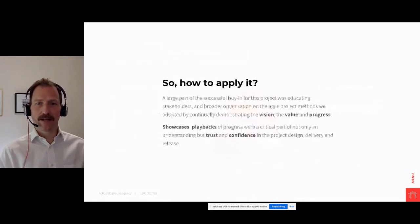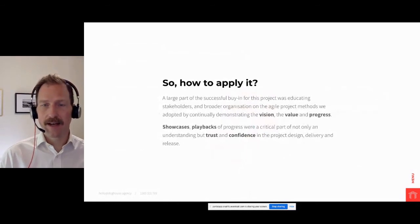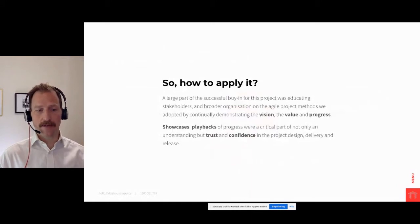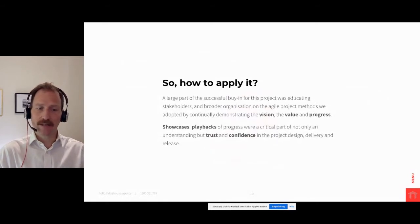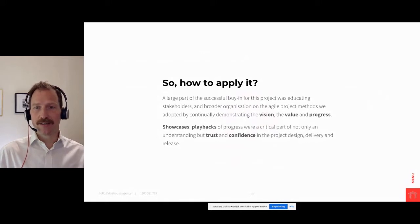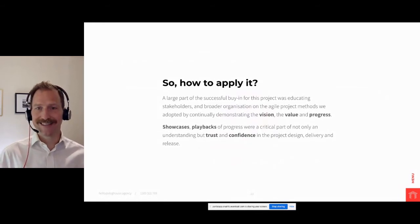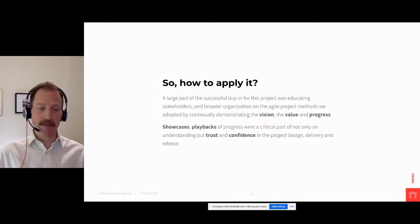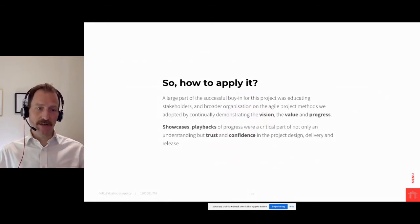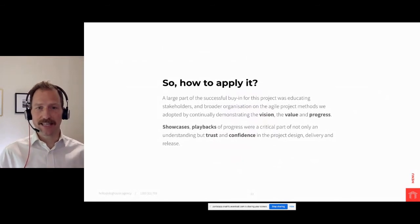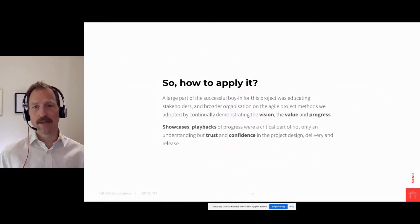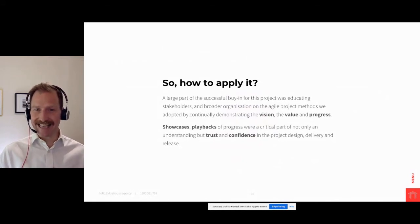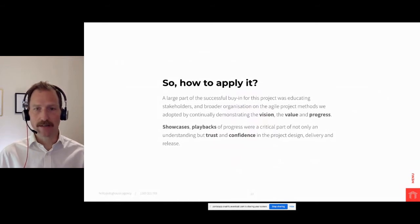So how do we apply it? A large part of the success that Elisa and the VCAT team went through to get buy-in for this project was educating their stakeholders. There's a lot of education and work which went on to support their organization, the stakeholders, and right through the organization to understand the agile methods so that they're adopted. Through the continual demonstration of their vision, the value that they're delivering and progress throughout delivery, they could see the trust in the process. We were constantly showcasing, playing back progress reports so that they could understand it and build the trust and confidence in the project's design, delivery and then ultimately what was going to be released and then continually released thereafter.